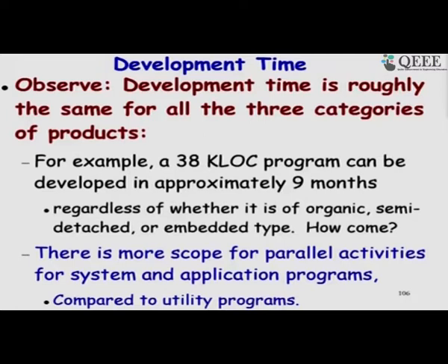In which phases of the development life cycle is the size estimation done? Okay, in the older times the size estimation was done at the beginning, at requirement specification, and of course, the estimation was very gross, because we have to estimate the lines of code, and the input itself we cannot estimate. The direct parameter itself is inaccurate and therefore, cost, effort etcetera will be highly inaccurate.